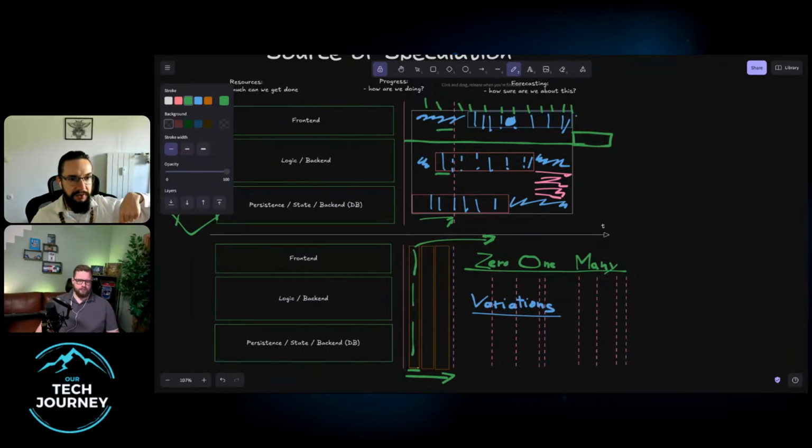If I'm wrong about that, and I need 2 days or 3 days or 4 days for a simple thing, then I was wrong about how complex the work is, which means I probably need help. And probably need help organizing it, splitting the work, and creating a vertical slice does make sense in that context. Which means that whenever you find yourself speculating, well, I don't understand the problem, but I'll figure it out as I go,